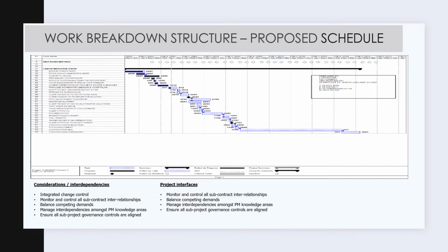Using an example of a schedule from a similar project, we'll need to develop a schedule for this sub-project with some key steps involved that include defining project milestones. To be considered in this instance are the interdependencies of other sub-projects and how the milestones impact on each sub-project milestone. Identifying sequencing activities and estimating durations of these activities. Once start and finish dates are established, all sub-project planning teams need to meet to confirm there are no conflicts within resource calendars.